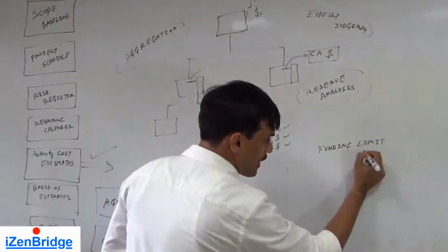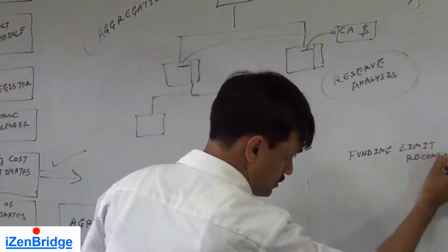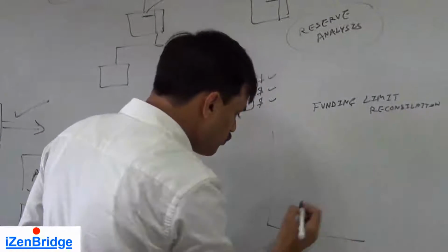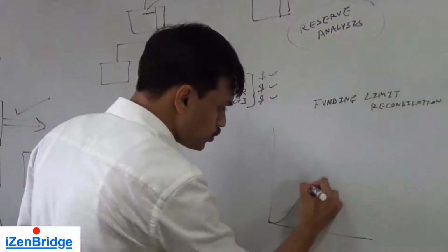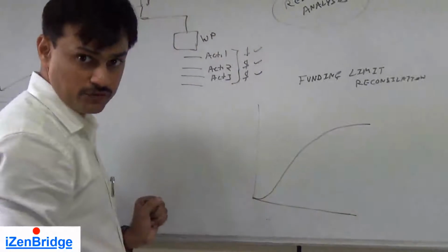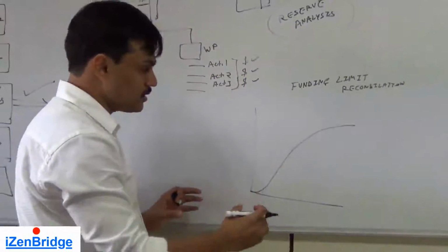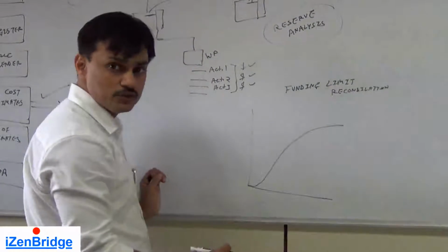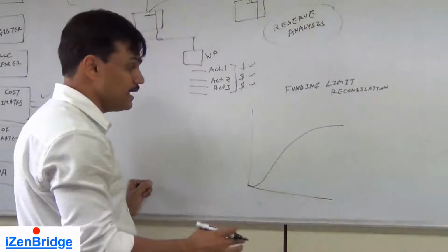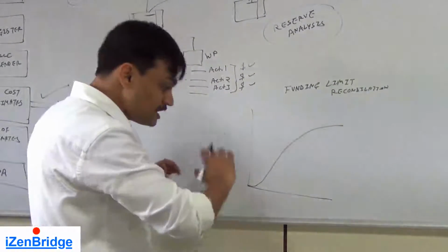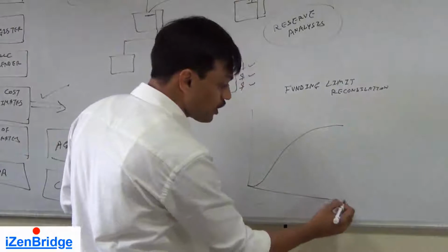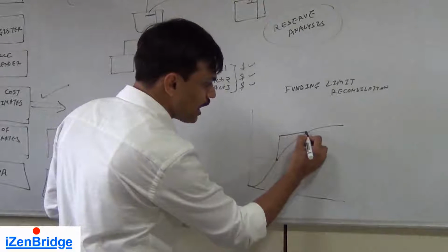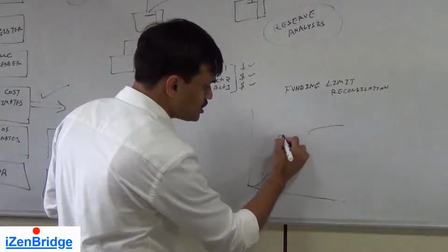Now, you would be spending money regularly. Your expenditure may follow the S curve, but you won't be able to take money from the sponsor just like an S curve. You won't be going every day to the sponsor and saying that today we need this much money. So depending upon your organization structure or a factor, you need to identify at which particular milestones you need to take money from the organization.